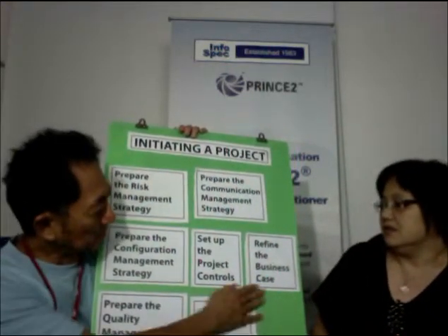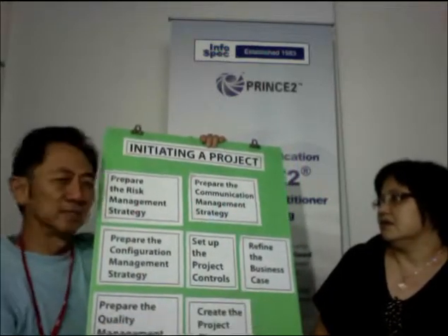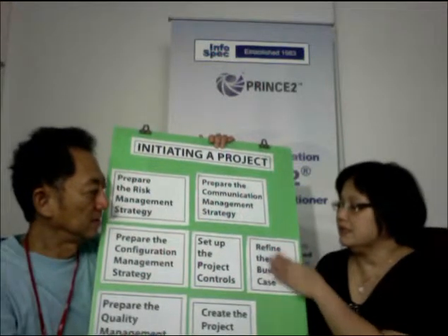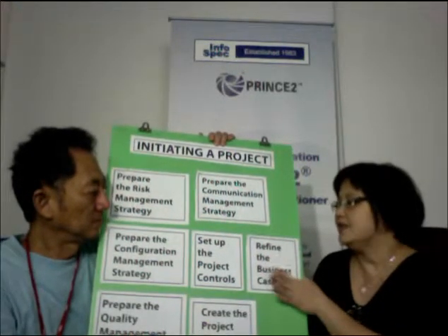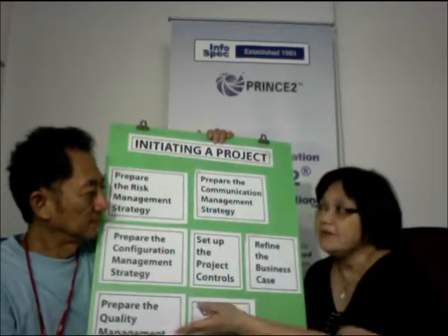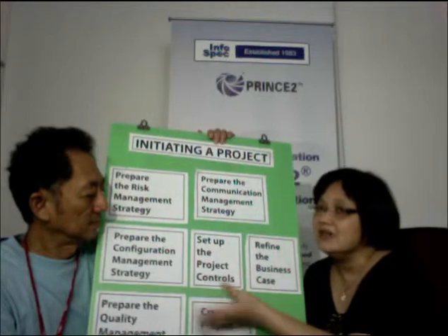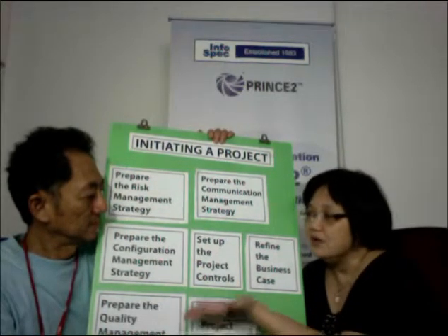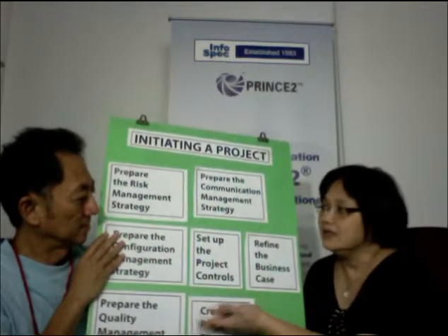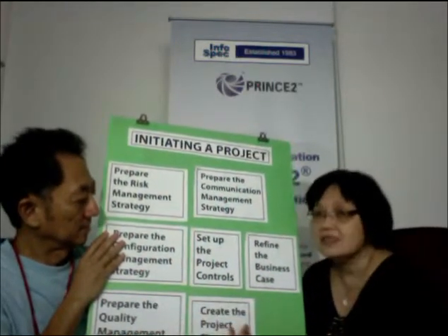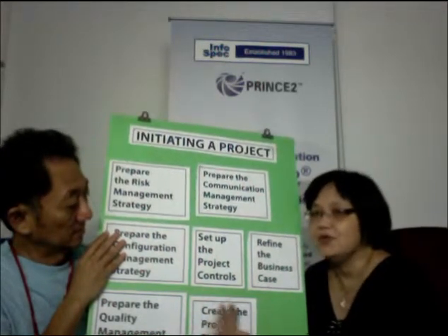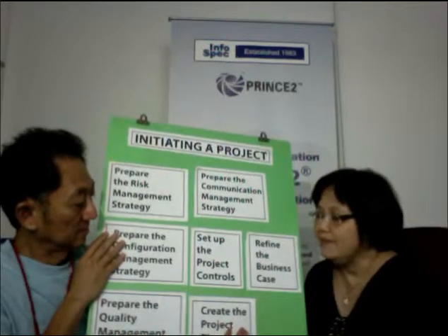I noticed there's something called refine the business case. Didn't we do the business case in starting up a project? Why are we looking at business case again? The refine the business case activities will be done after we create the project plan. From the outline business case, we are given a budget and a timeline, and when we do product-based planning and a detailed project plan, we know how many stages we have to do, what the resources are, what the timeline is and whatnot.